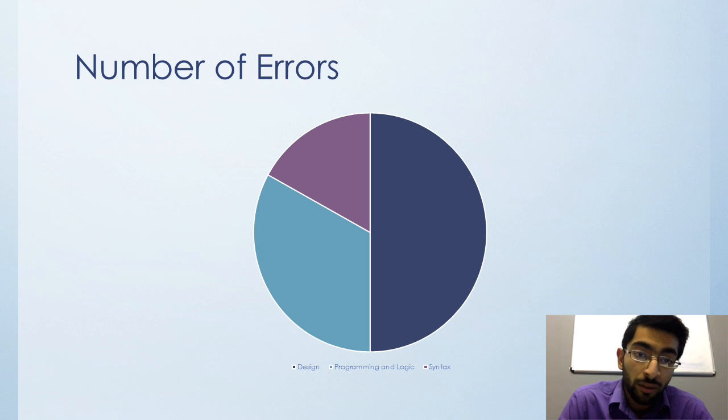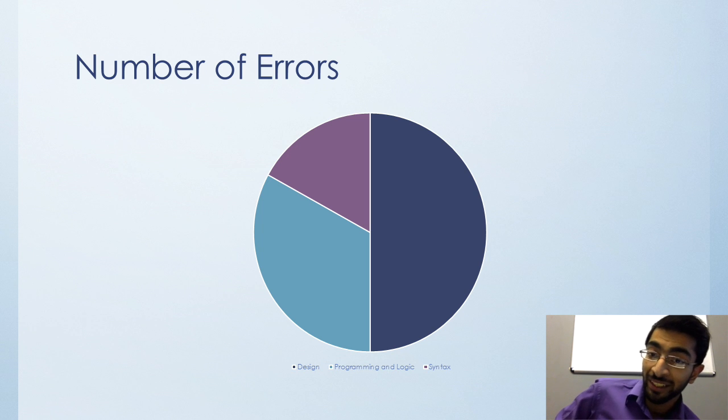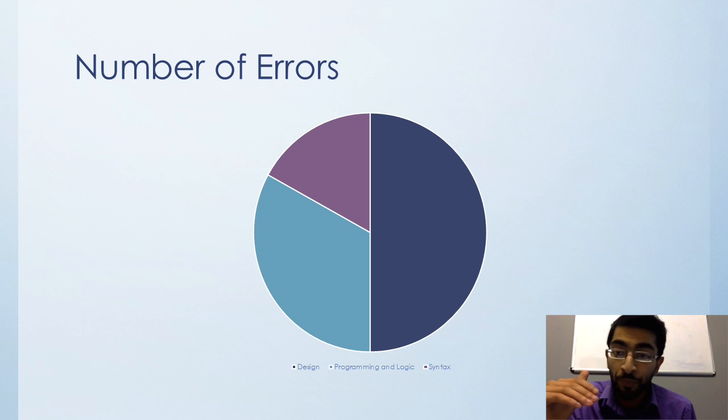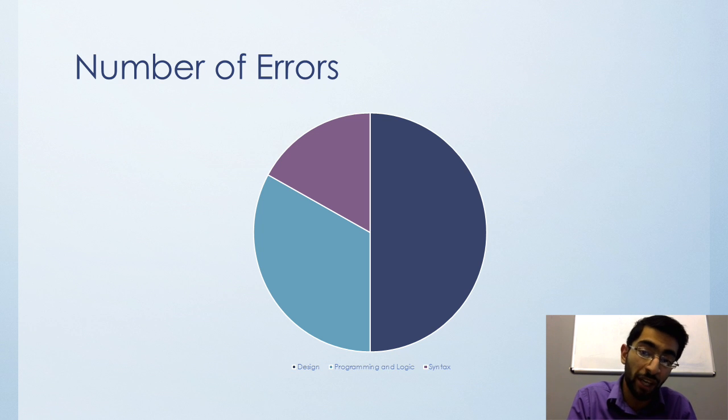The longer the fault remains undiscovered, the more it costs to fix it, is the general rule, because if this project has been implemented, it is being used. If it is being used, then there is a certain amount of data being stored. This data being stored is building up the size of the application, therefore could be causing errors somewhere else as well, and you just haven't found those errors yet.